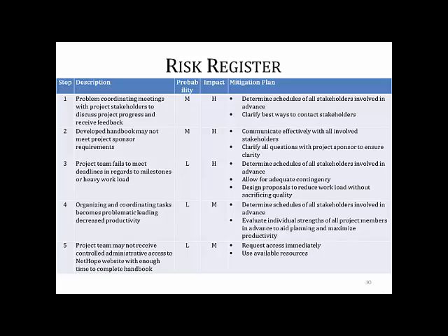The second risk is that the handbook may not meet the requirements of the sponsor. The probability is medium while the impact is high. In order to mitigate this risk, communication between all stakeholders is very important, and the team has decided to clarify all questions before finalizing content.